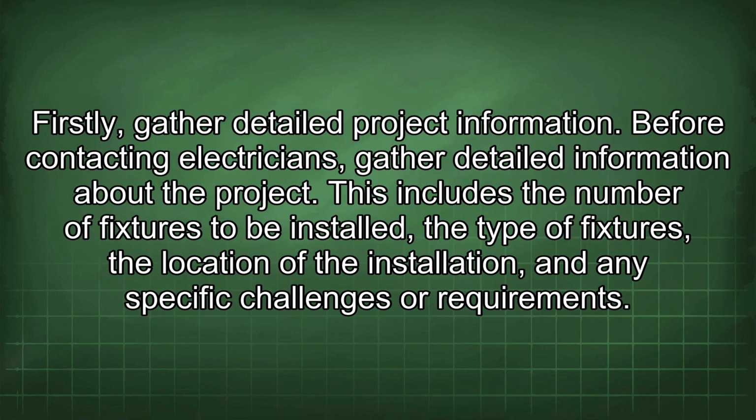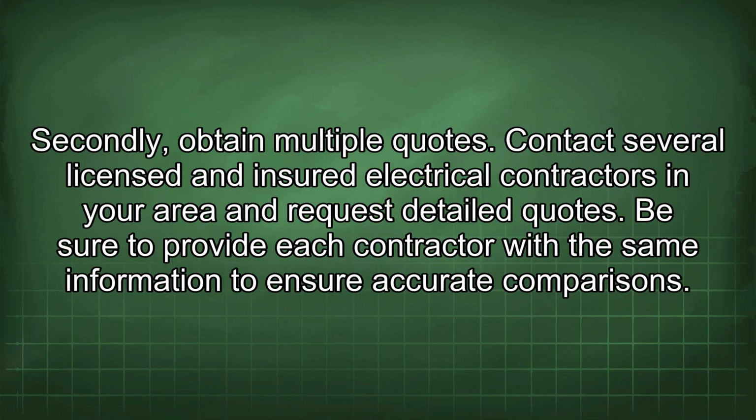Firstly, gather detailed project information. Before contacting electricians, gather detailed information about the project. This includes the number of fixtures to be installed, the type of fixtures, the location of the installation, and any specific challenges or requirements. Secondly, obtain multiple quotes.